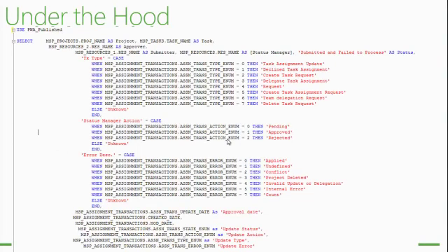The last action code is basically rejected. So that gives me all the actions that have been taken or are pending on these transactions, these task updates. And finally, do I have an error that was generated by the system after the task update was acted on by the project manager, for example? So the system also tracks all these events. So you have all kinds of values. Most of them will be 0. That means it's applied, everything flowed, and it's fine.